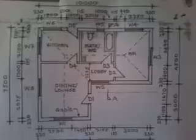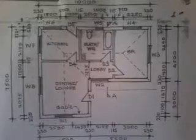Here in trench excavation we'll be using the cross section, which we didn't use when calculating the topsoil. Here's the cross section. It will be a bit tricky because with topsoil we just calculated the area, but here we want the center line — which is always referred to as the mean girth — which is very important when calculating bill of quantities because we use it everywhere. If we get it wrong, everything calculated after this will be wrong.